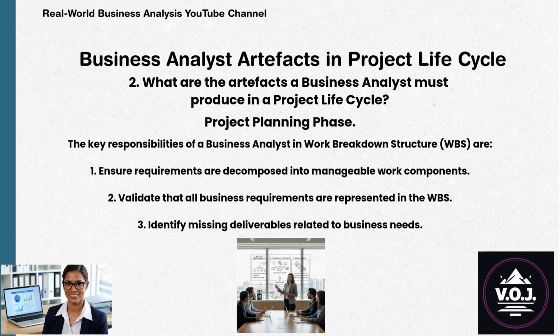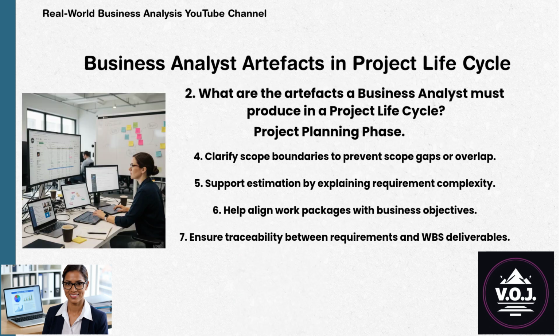The key responsibilities of a business analyst in work breakdown structure, WBS, are: 1. Ensure requirements are decomposed into manageable work components. 2. Validate that all business requirements are represented in the WBS. 3. Identify missing deliverables related to business needs. 4. Clarify scope boundaries to prevent scope gaps or overlap.